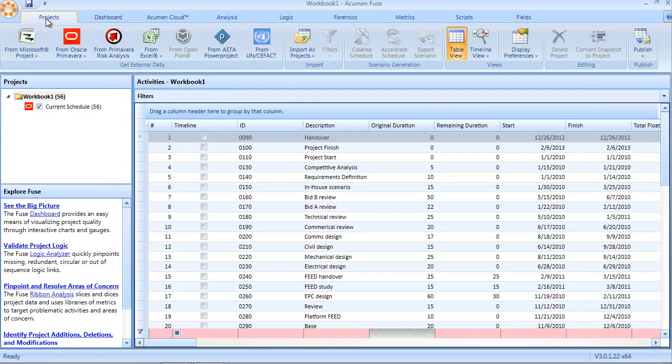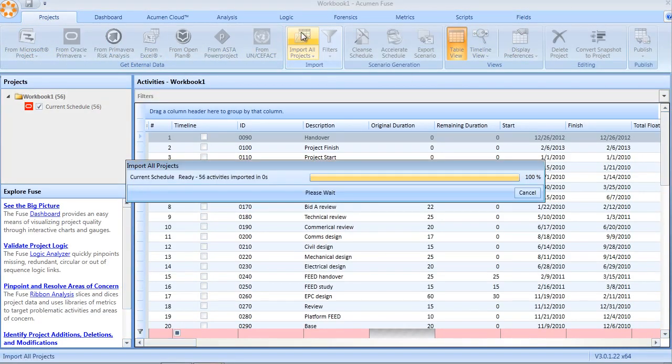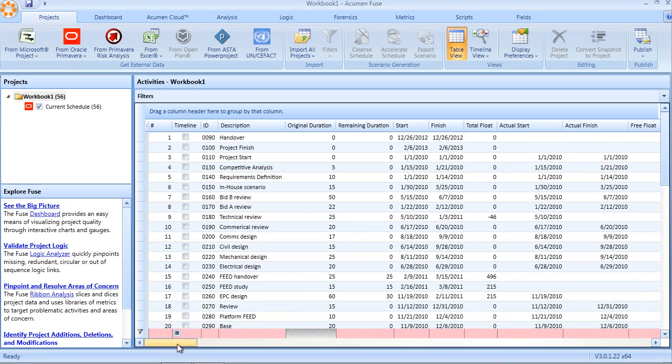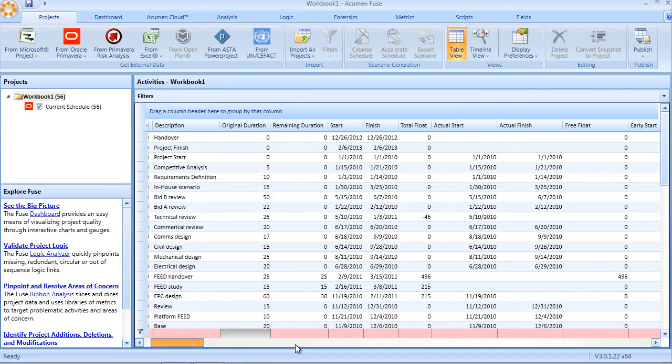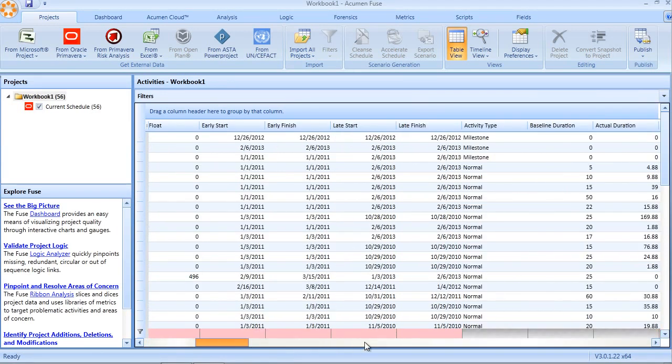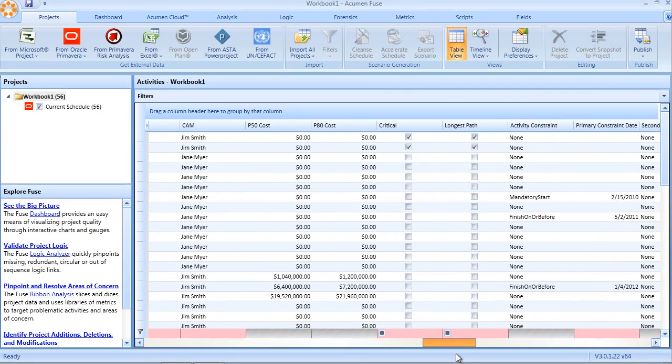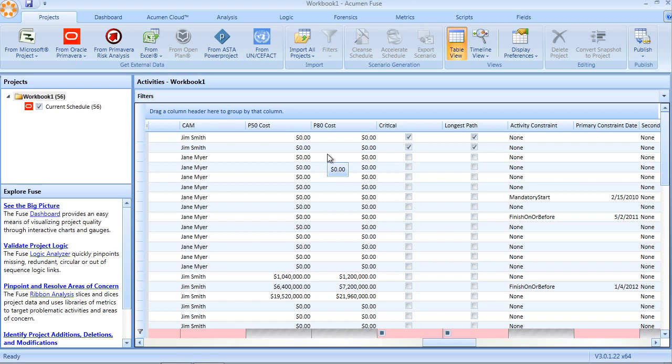So, if we go back to the projects tab, we'll update our import and if we now scroll through the spreadsheet, we now see our P50 cost and P80 cost, the two new fields that we brought in and manually mapped in the fields view.